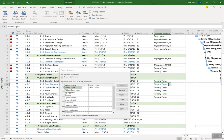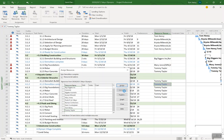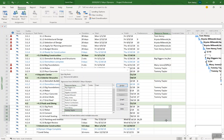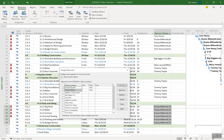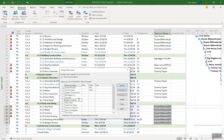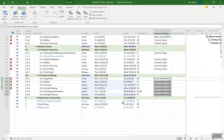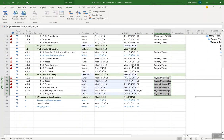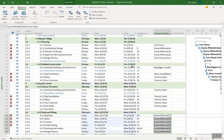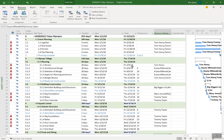This is bringing up the assign resources dialog which will allow me to assign resources to the tasks that I selected all in one go. For this time I'm going to put Tommy on there and you can see he's been assigned to all of those. You see I actually made a mistake and did actually assign Tommy there, I can use this same dialog to remove him. So another nice thing about the assign resources, I come in and let's try that again. For these tasks here I'm going to assign Krista and Tommy at the same time, boom. I can adjust the units up or down here as well if I wanted, maybe Krista's working part-time. There we go, quick and easy. So that's how you can assign resources.